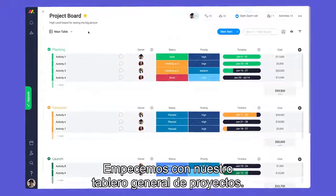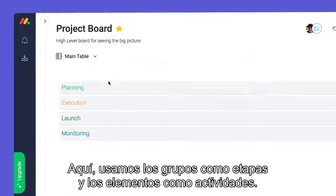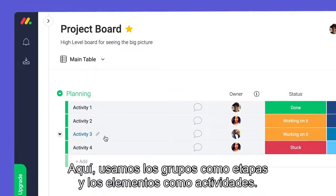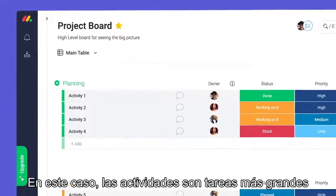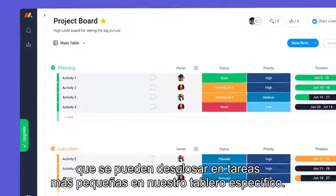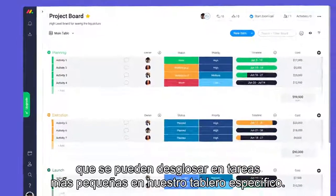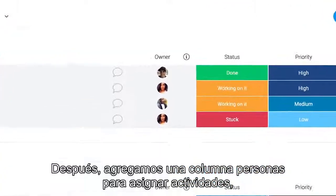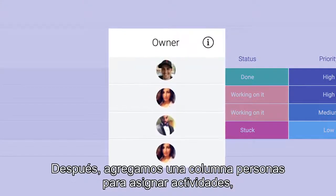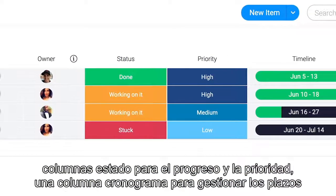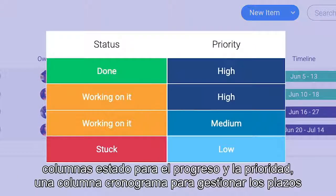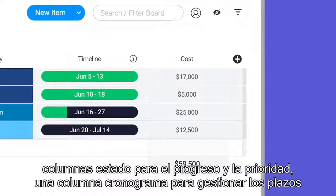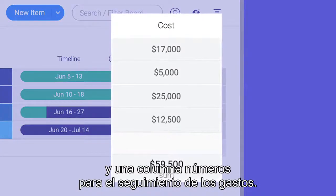Let's start with our high-level project board. Here, we're using our groups as stages and items as activities. In this case, activities are larger tasks that can be broken down into smaller tasks on our low-level board — more on this later. From there, we've added a people column for assigning activities, status columns for progress and priority, a timeline column to manage deadlines, and a numbers column for tracking expenses.